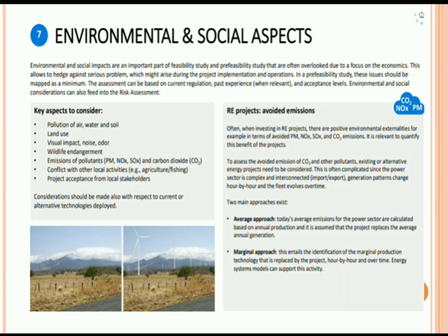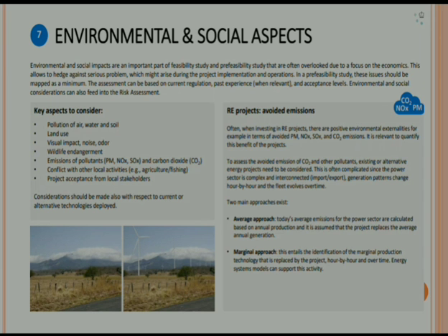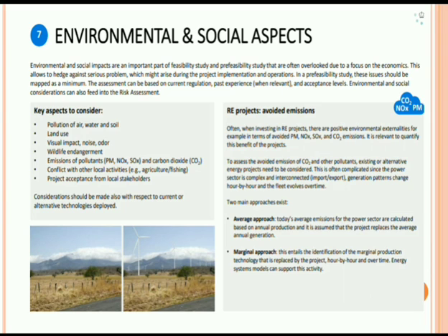In this step, environmental and social aspects, we have to consider the environmental and social impacts on the project. In this, environmental and social impacts are an important part of the feasibility study and pre-feasibility study that are often overlooked due to the focus on the economics. In this, it will allow the hedge against the serious problems which might arise during the project implementation and operations of the project. In pre-feasibility study, there are issues that are mapped into the minimum. The assessments can be based on the current regulation, past experience, and acceptance levels.